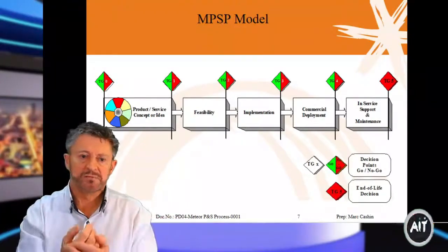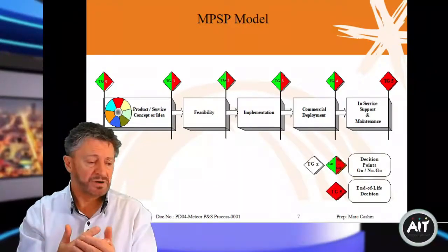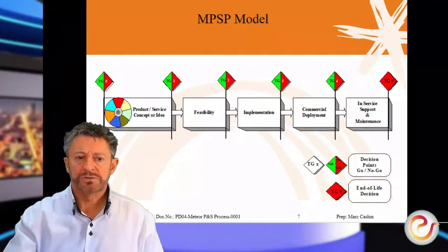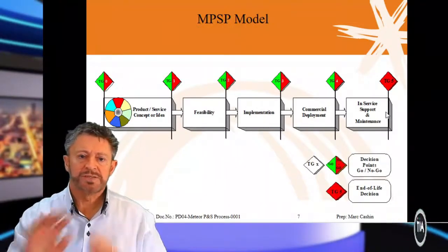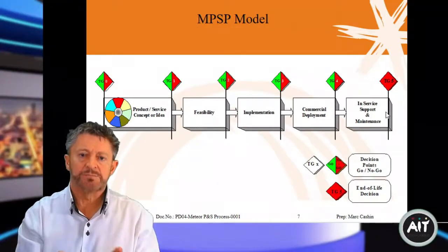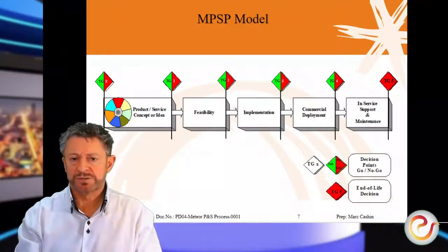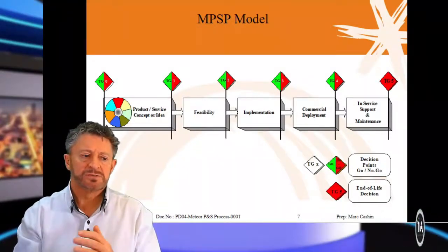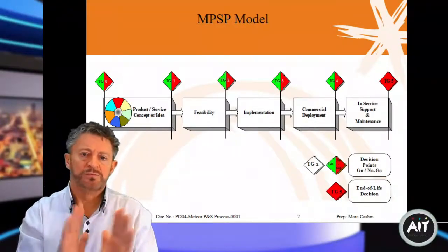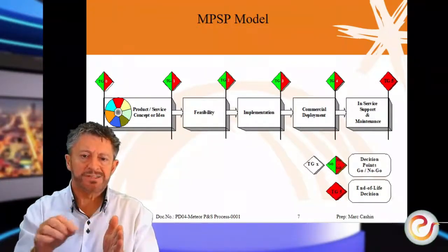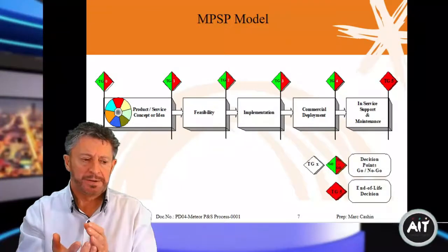People either find something new, a replacement, and at that point we try and delay what we call tollgate 5. Tollgate 5 will say, right, that's it, we'll retire this product. We'll come out with the next version of it, or we have something totally different and that's more appealing. So we say, that's it, cut it off, no more money spent on this. But we try and, as we say, bleed it as much as possible, get as much revenue.